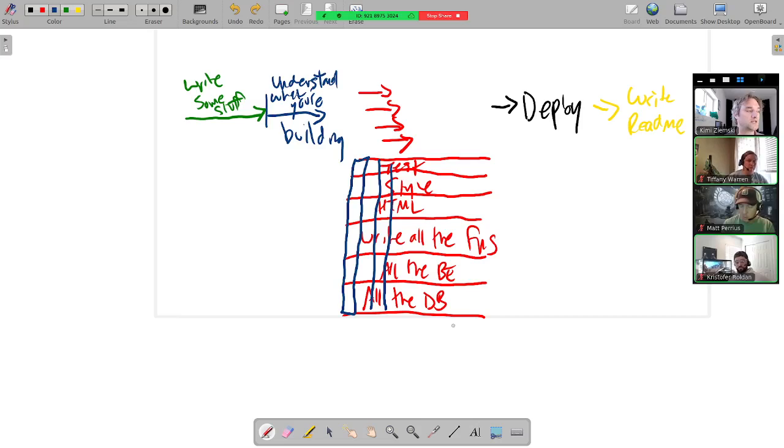And this has to do with our working in complete units idea. This is what a thin vertical slice is. 3 entire features is way more valuable than 10 kind of half-started features. Or I got you all 10 features, but they don't have any styles and they might not work.